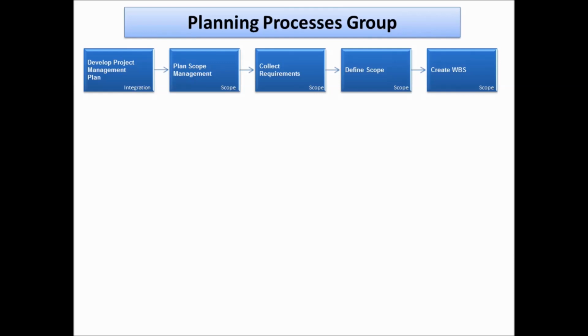I want to give you another key concept here. If you do not define all the work packages in the WBS properly, then we are prone to something called scope creep. Now, what is scope creep? It's basically the scope extending its boundaries. Let's take an example of a website design project. If any specific demand comes up during the course of the project to add an unplanned feature to the website layout, which was not agreed during the planning process, then it's scope creep.